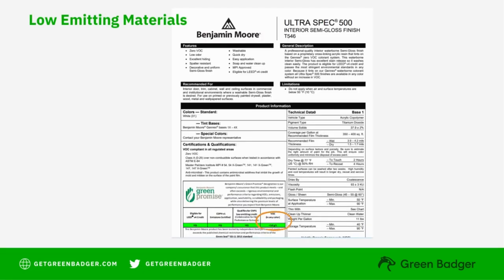Here's an example of a Benjamin Moore product data sheet showing the VOC content. MSDS sheets typically will show VOC content in Section 9, but whichever document you use, you're looking for the VOC in grams per liter, and this is the number you'll record on the cover sheet.